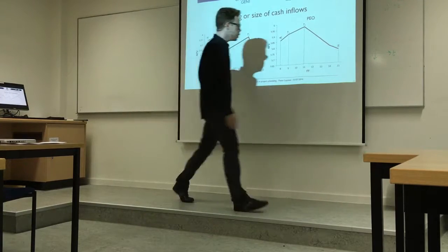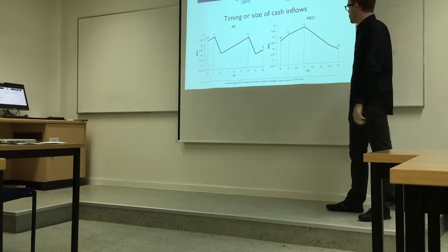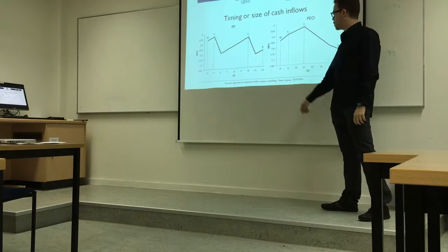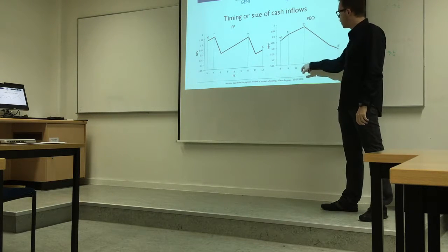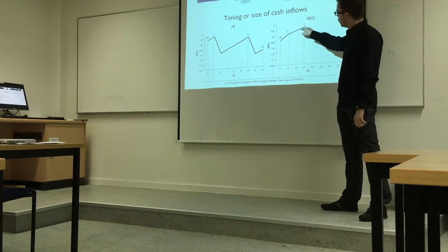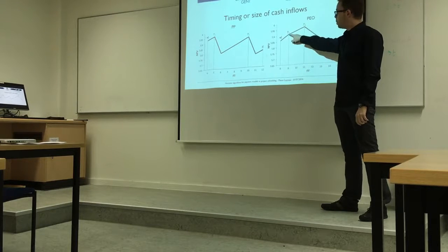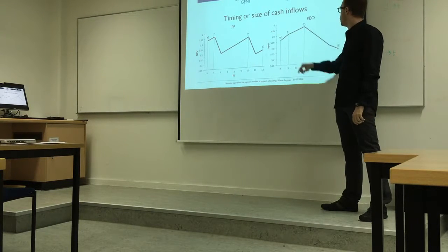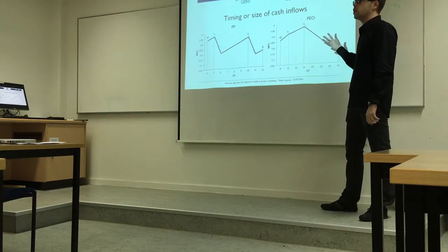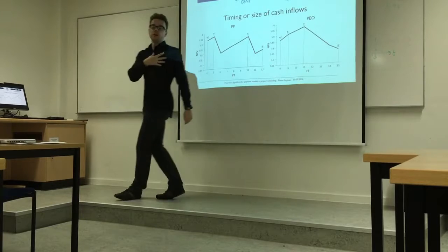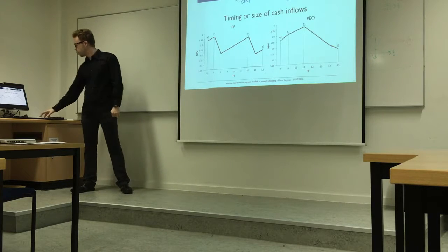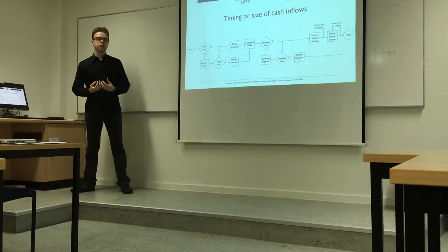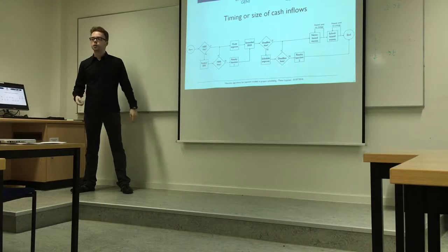If time intervals are not fixed — for instance the first interval goes from 0 to 9 and the second from 9 to 11 — it's best to schedule the activity at the end of the first interval, and delaying it further makes no sense. Of course this is the single-activity case; once you consider sets of activities, you must look at their combined NPV. This figure extends that reasoning.